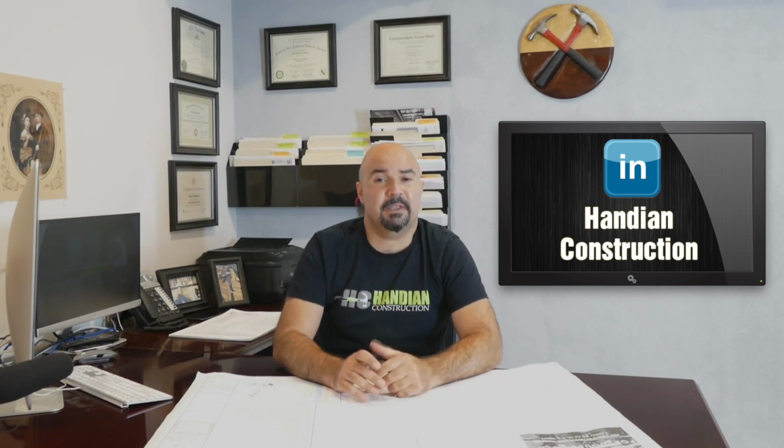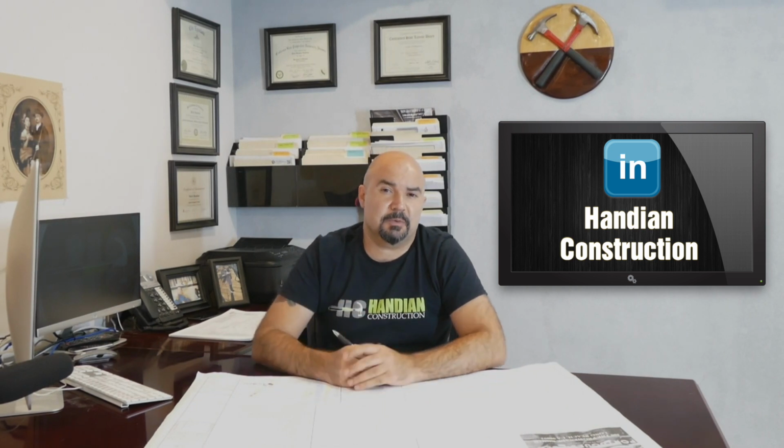Now, when you're doing a waiting game, when you have subcontractors on site having a nice routine operation and everything's going smoothly, and you get them to stop for 2-3 weeks, that kills momentum. And by the time you bring them back, the timing and the schedule gets very sloppy. That's why you've got to make sure once you start something, you let it run very smoothly. You don't want any gaps.